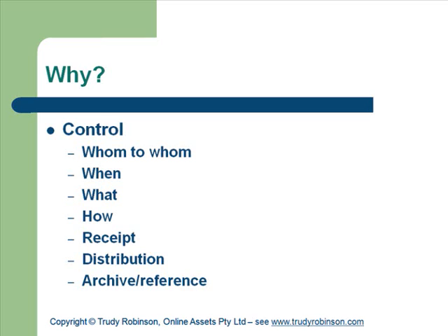So it's when. Quite often one of the simplest and most common forms of communication in a project is a weekly project meeting, which is where you have status reports coming in. You sit down in a group, usually in the middle of the week. You have a group hug, you go through your status reports, you come up with the minutes and you come up with the action items. Then everyone goes and updates the risk register or the issue register or the work breakdown structure or whatever, all the outputs from that particular meeting.